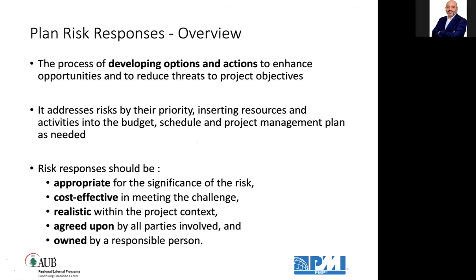I don't want to hunt a sparrow with a cannon. Okay? I don't want to put a risk response strategy that costs me more than the potential loss. It should be cost effective in meeting the challenge, realistic within the project context, agreed upon by all parties involved, and owned by a responsible person to initiate this response strategy if and when the risk occurs.